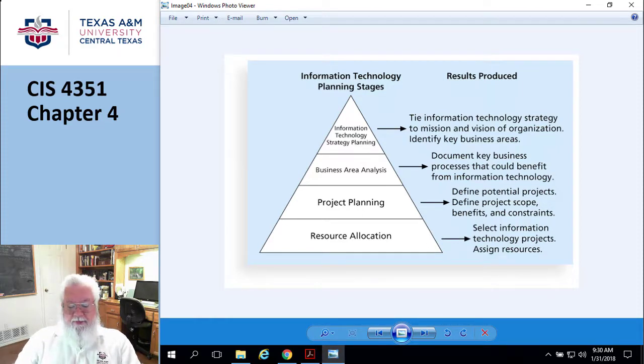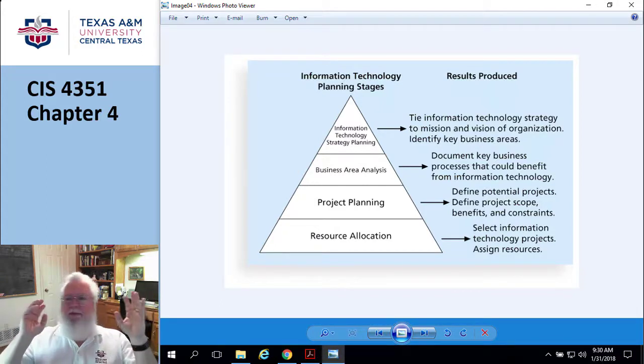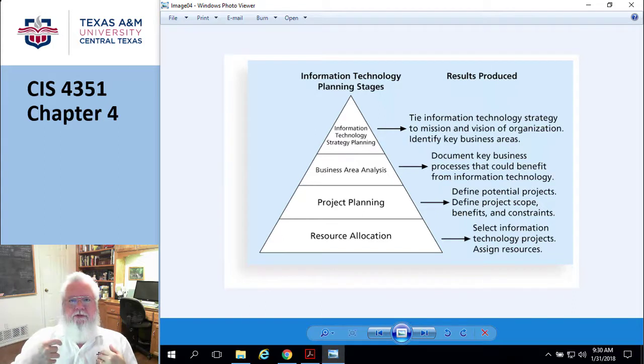So on page 146 they finally get to the methods, 5 examples, common techniques for doing project selection. The first one is kind of a simple one. I'm selecting this project because it meets the broad organizational needs. An example would be, which one of these projects is going to be the best for improving customer satisfaction? That'd be a good one. So it's just subjective. You look at this one and go, oh, here's a good one. Just go through them and say, which one of these is going to meet this broad goal? Again, somewhat subjective, but that's okay.